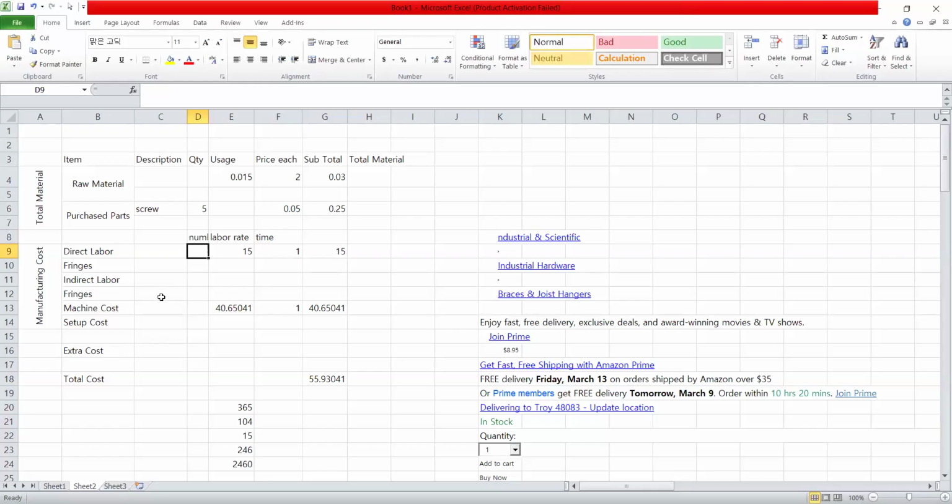Now, the machine cost, this $40, I roughly put it at 100,000 cost, and calculated the number of hours. This will also be given to you by your finance department. Whatever cycle time you considered for labor, the same will be applied for the machine. This is the same number you will put here. This is the time for the machine as well. And again, it is based on your skills and knowledge. So you will estimate this one.